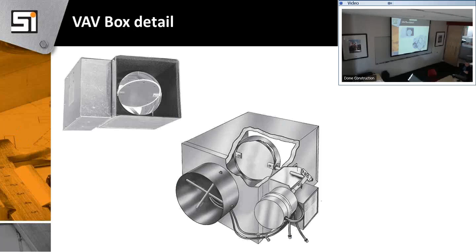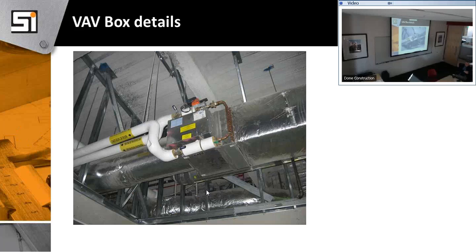Typically the control guy supplies the control valve. So we'll mount it, we'll pipe it, and then he'll control it. The controller here, the controller there, he's controlling both the actuator and the reheat valve right there. So he has the controls right there. So what's the reheat valve?